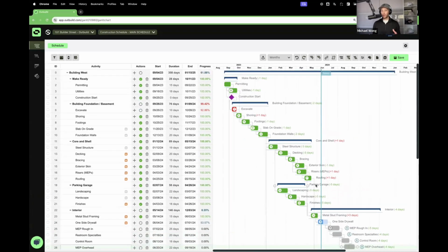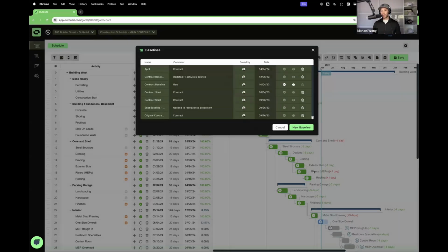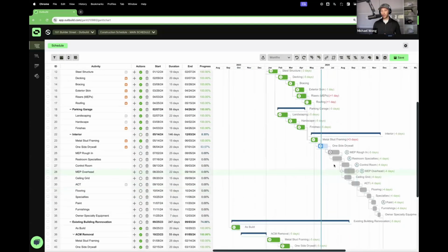Now, once you've made your main plan and you've figured out as a team which milestones you want to drive to, which phases you want to execute at which times, you can actually baseline all of this work as well. Again, holding your team accountable to that first plan that you had compared to where you are now. You can turn on as many baselines as you want. You can baseline at any time. That's what these little blue lines underneath each one of these schedule items are.